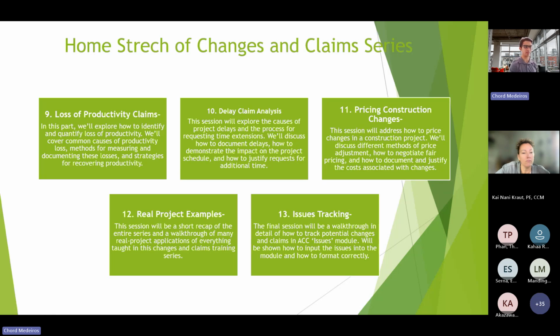But Marvin has a question here. Contractor walked off the job, and I thought there was a disagreement. Maybe it should have been a directive by the resident engineer to proceed by field order and track work with worksheets, with a change order to follow if the work cost could not be determined at the get-go. Yeah, so all of that happened. They had a field order already, which is why they were in the field. Then they got a memo telling them, if you decide to leave, that's your means and methods, your volition.